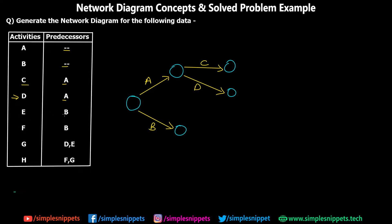For activity E, B must already have happened. Since B leads to its end node, E starts from there. Similarly, F also has B as its predecessor, so F starts from the same node as E. I'll draw both E and F starting from the node reached after B. By the way, I recommend drawing this network diagram with a pencil the first time, since you'll likely make mistakes.